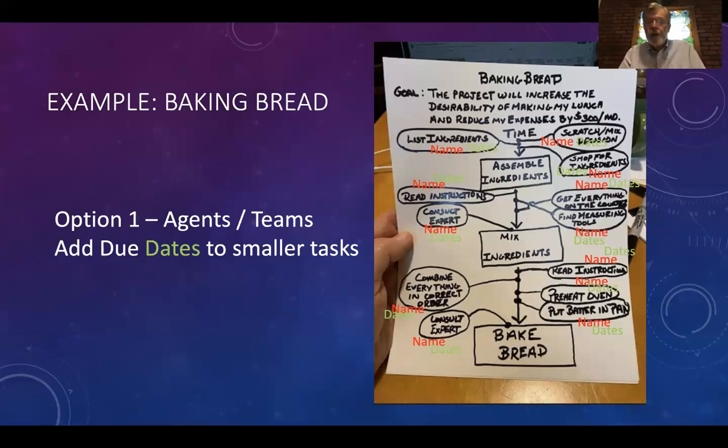You can also, as an option, add dates. So when is this thing due? Now, here's a little thing you should write down. Whenever you use dates on a project plan, it should be the completion date, not the start date. Why? Because start date doesn't mean anything.